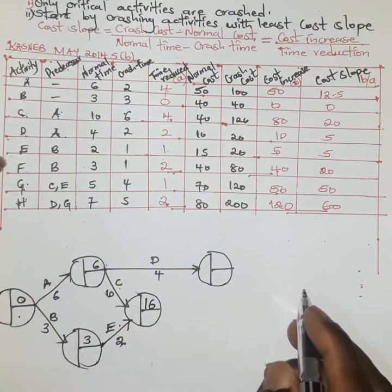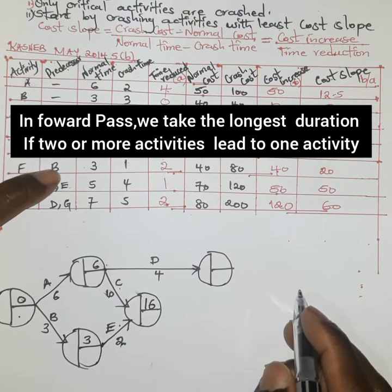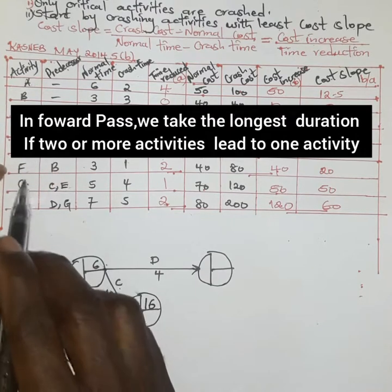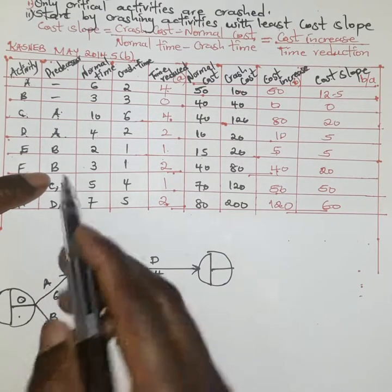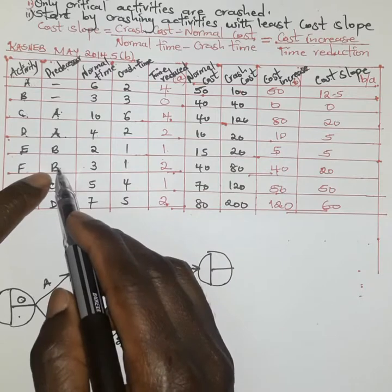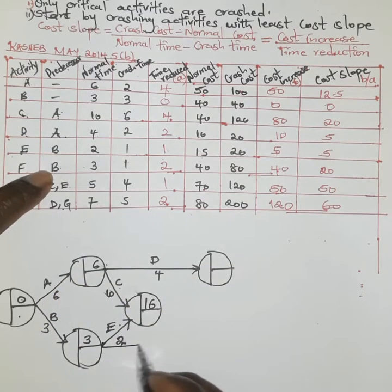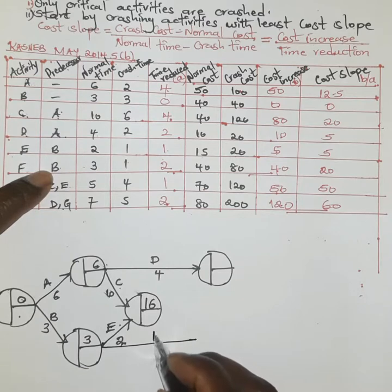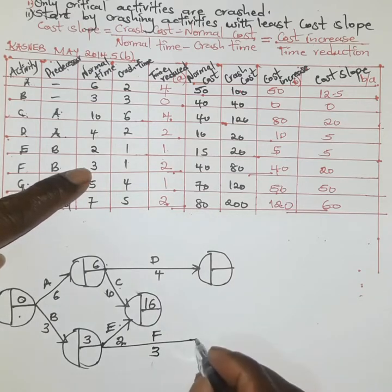Activity F begins as soon as B completes. Since F does not affect any other activity and we don't yet know its terminal node, we draw it and leave it temporarily. Activity F takes a duration of three weeks.